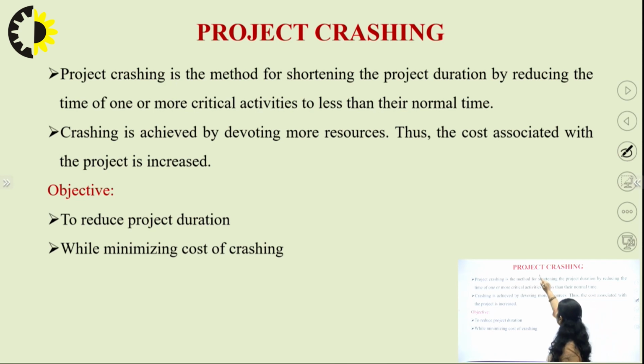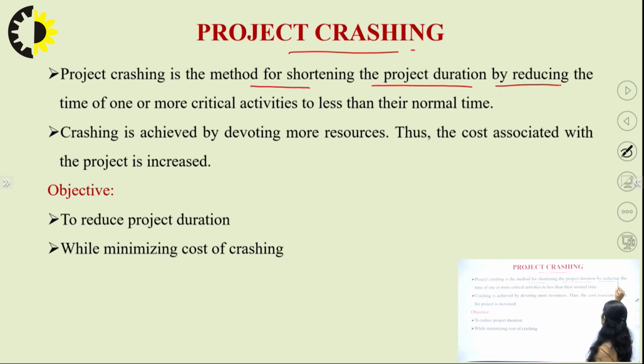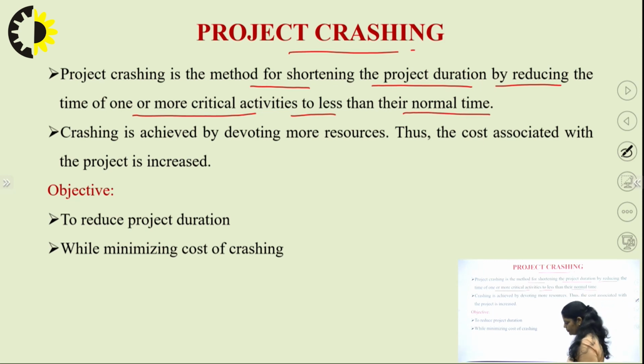Now we come to the next term, that is project crashing. Project crashing is a method for shortening the project duration by reducing the time of one or more critical activities to less than their normal time. There are cases when we are required to complete the project in a shorter duration.